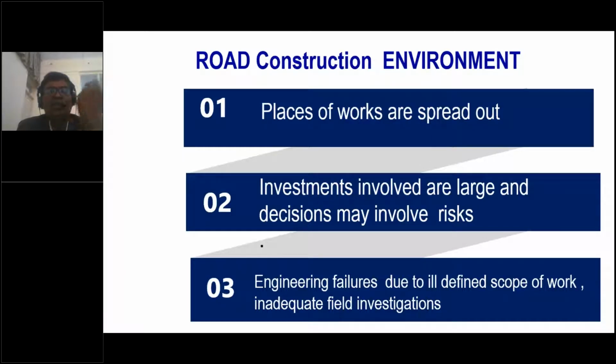Road construction projects, all major projects run into 100,000 crores, and even the smallest road project, the PMGSY project, runs into 2-3 crores. So any small mistake during the execution, any mistake due to the decision we make, involves huge financial risk, and this is the reason many times we are scared to take decisions. We wait for the green signal. We wait for the approval.